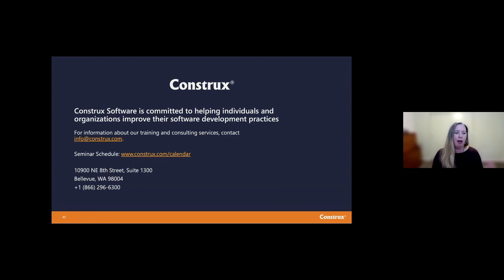A big one that I'll often do at the team level is if we have an implementation or a construction column, I'm looking for things like, are test cases being written and reviewed as exit criteria for that column. So I want to make sure that we're parallelizing work as much as we possibly can. But yeah, you could certainly establish exit criteria that made work not parallel, not overlapping, and that would be bad.